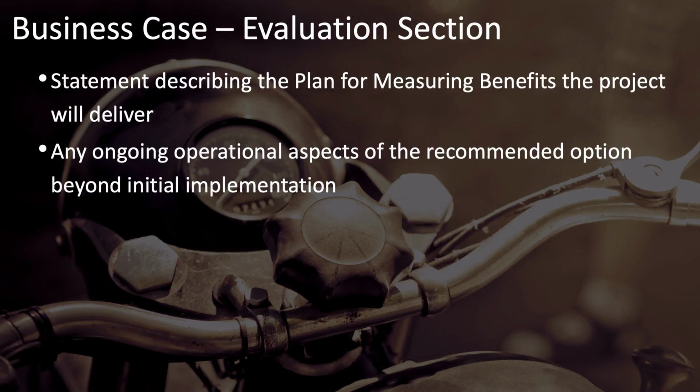The development of these two documents, the business case and the benefits management plan, is iterative. Developing the business case based on the benefits management plan can cause you to learn that there's a better option or approach to meeting the need that's identified in the needs assessment. This can change how you'll measure success, which changes the benefits management plan, and in turn can change the summary of the benefits management plan that is found in the evaluation section of the project business case.